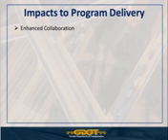And the part that I'm really excited about is adding the resources. It may not happen when we roll it out in May, but we will have the opportunity to link resources to the activities, which is something Russell's been working on. We've been working on for years when I was the state scheduling engineer, still trying to link the resources to the activities. That is the only way that we will be able to determine if we can truly deliver the projects on time.